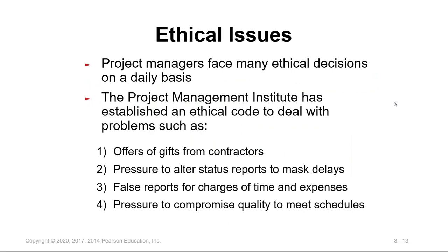Project managers face many ethical decisions on a daily basis. The Project Management Institute has established an ethical code to deal with problems such as, in most cases, offers from the contractors for gifts. Offering gifts from a contractor will not be acceptable. Pressuring to alter status reports to hide delays is not acceptable. Also, false reports for charges of time and expenses that did not even exist are not acceptable. And the fourth one is to be pressured to compromise quality to meet schedules, and that's also not acceptable. So the Project Management Institute, the PMI, has established these ethical codes, so it will be across the discipline and standardized between the different organizations.